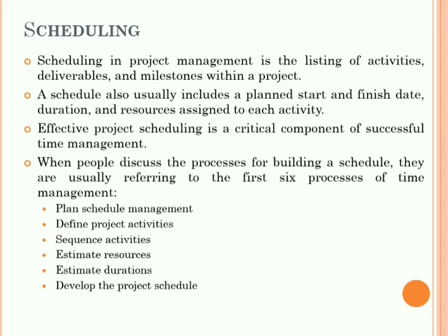Next thing, you have to keep different risks in mind. You have to identify and document any factors that pose a risk to staying on schedule. It will help your risk management efforts also. Next, you have to consider any non-work time. For example, make sure the vacations and holidays are reflected in your schedule, so that you are not assuming people will be working when they are not working.